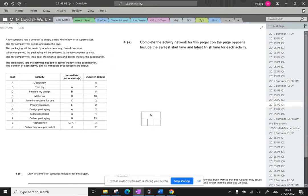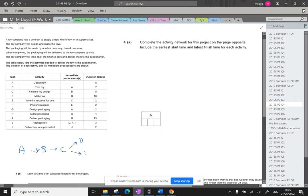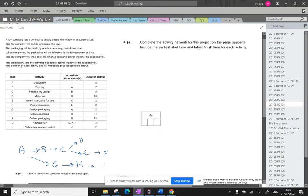I will do a little sketch here. So we've got A starts us off and then A going into B, B goes into C, and then D and E both have to have C behind them. F is after E and then this is where we need to be prepared. So G is after A, H is after G, I is after H, and then J is after D, F and I, and then we've got K after J. So that's great. Right, we figured it out.